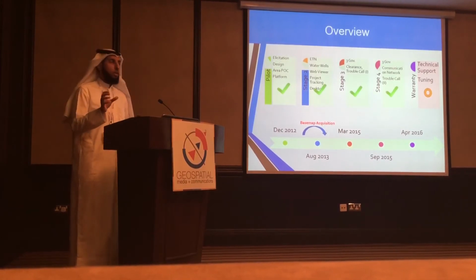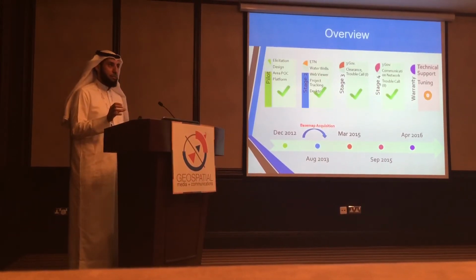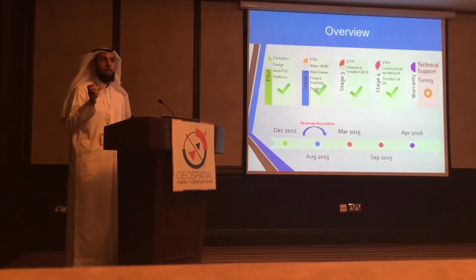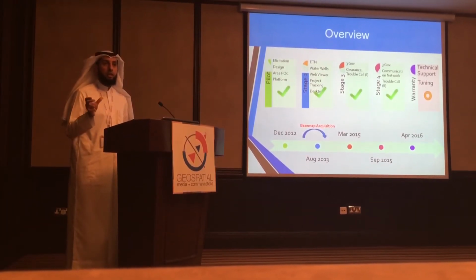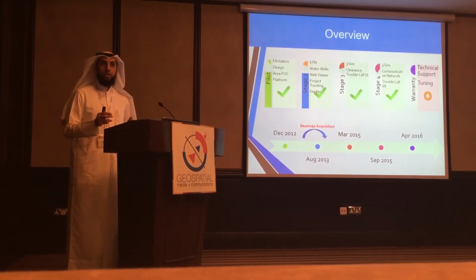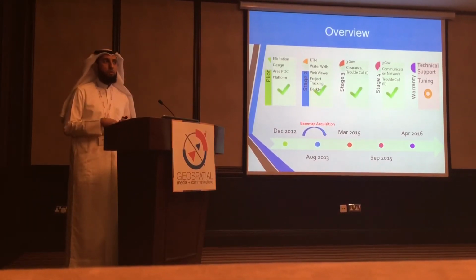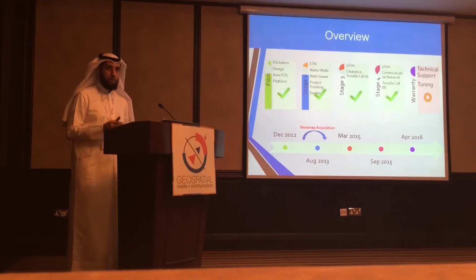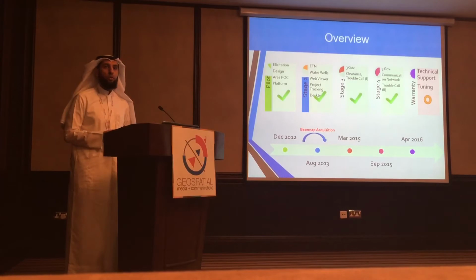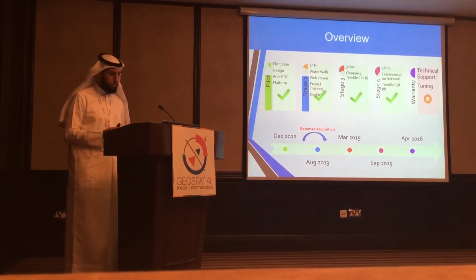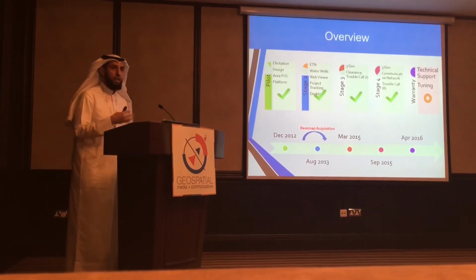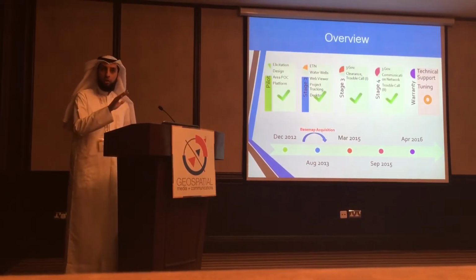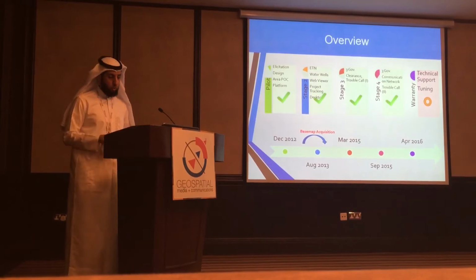The main reason is that some of the base map components, especially the parcels layer and the road edges layers, were not ready at that time. Kuwait Municipality is the only organization in Kuwait responsible for developing and maintaining this data, the base map. After they prepared the base map, they provided MEW with the base map, with these layers especially, and we proceeded with the implementation. In stage 2, we finished all the transmission network, the water and the electric transmission network.